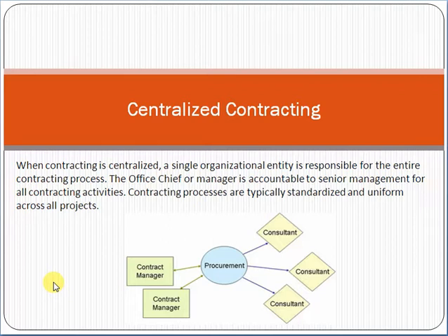Do you know the definition of a project? A project is a temporary activity which has a beginning and an ending point, and it gives you a unique output or product. For example, if you are implementing an e-commerce solution for a customer and your target is to complete that project within 4 months, and after 4 months the project will finish, resources will be released and no more expenses will be there on the project, we will say that it's a project.